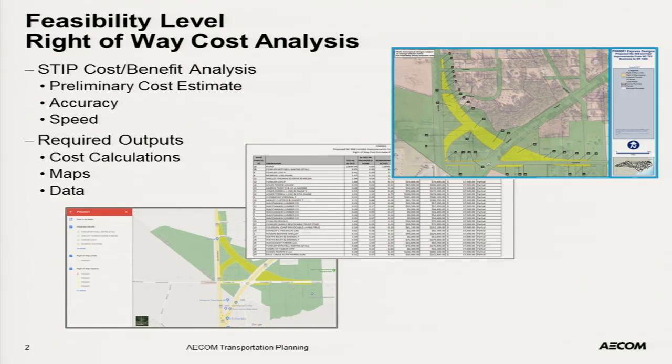They said, well, this is what we're doing. At the time, they had a tool where they could basically draw a line for a project or a point if it was an intersection, and it would come up with a rough estimate of what they would need to pay to acquire the right-of-way that was nearby. But some of those estimates were off by more than they were comfortable with. So they wound up reverting to doing things by hand, taking the maps and measuring things and using that to try to determine how much of these properties they were going to take.